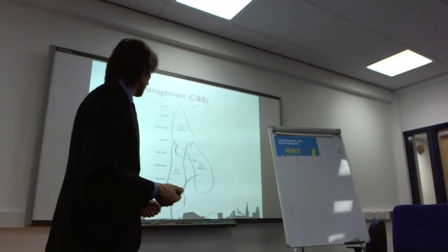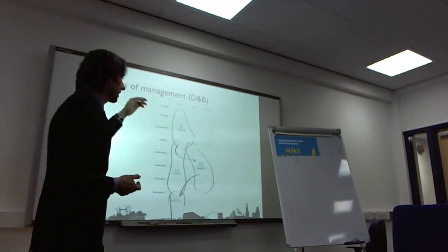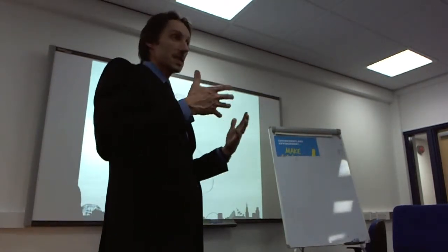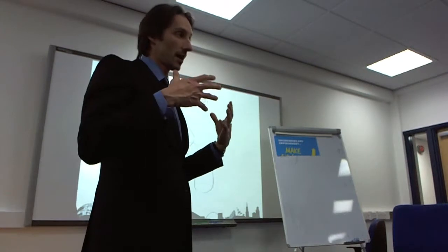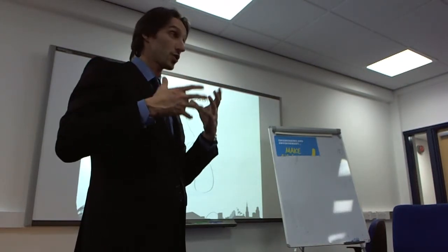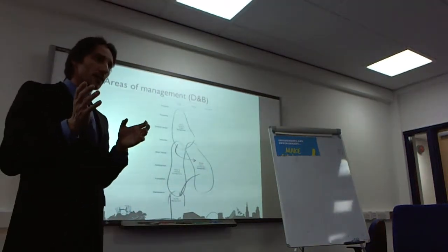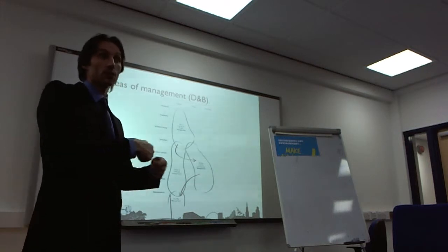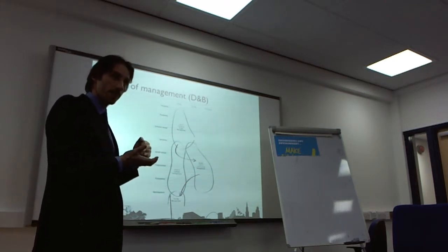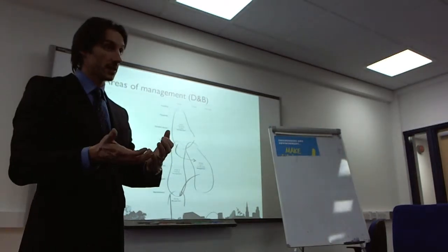Design and build is a different pattern whereby you only produce an outline design of your requirements. So you define the specifications of what you want to achieve, and you set some constraints about it. Then you ask contractors, on non-completed designs, to provide you a complete design and the cost.